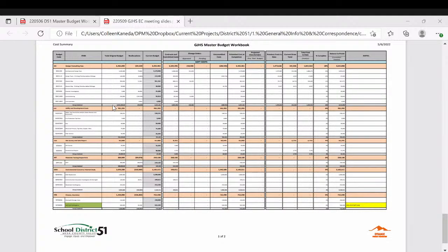And then the other thing I'll say about contingency, and FCI is going to review that today, they hold contingency on their side as well. So part of our procurement process, it's very typical that the contractor holds construction contingency on their side, because they have some unknowns that they have to figure out and not come back to us for more money. So you'll see some significant dollars.